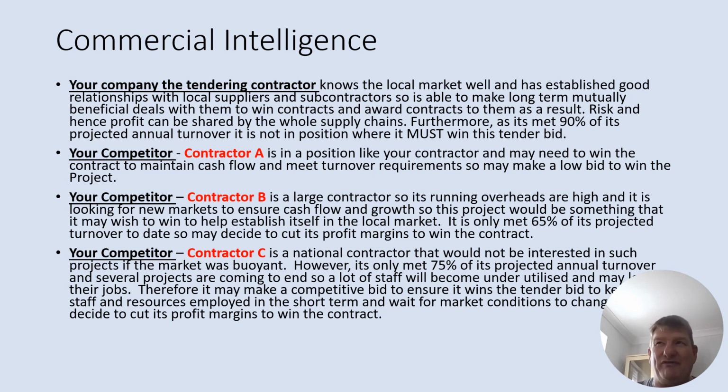It might go in for a low bid because this would secure its annual turnover of 8 million. Okay, that's in your favor too. But whether it would like to take the same risks with regards to the time, the 16 weeks and the liquidated and ascertained damages, it might not. They themselves are probably operating under a similar objective to High Holborn, your company. Let's just keep the order book going, keep turning over work, make sure we've got continuous work so we don't have to make anybody redundant. We're not in a precarious financial position, and let's just wait for the good times, so it's just really a matter of surviving in many respects. You're quite conservative. Local firms will be quite conservative in what their objectives are.